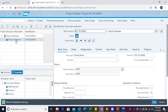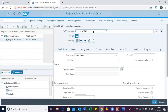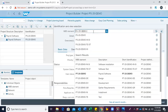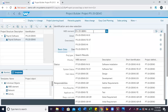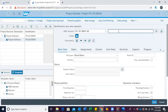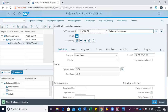Since we want to create all these WBSs under the payroll software, we place our cursor on payroll software, which is the first level WBS. We right-click, hover on create, and then click WBS. We are presented with the detailed information in our work area. We use the code GR and then the description would be gathering requirements. Then we hit enter, and we can see that it is reflecting in our structure tree.